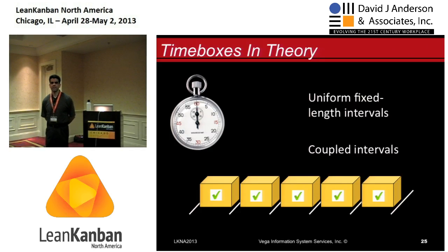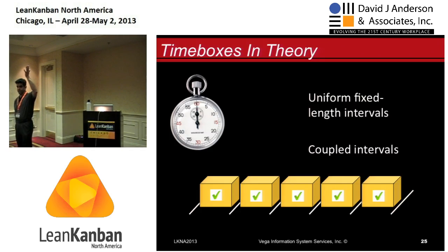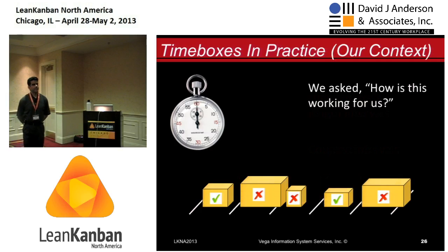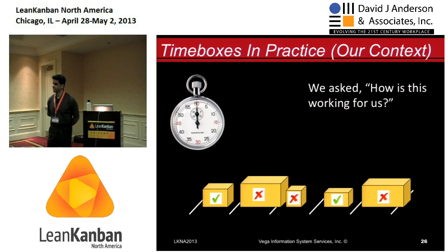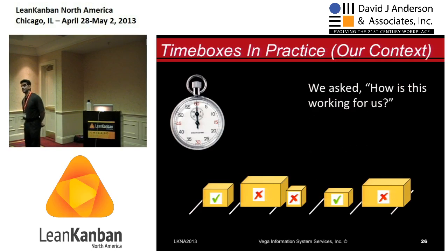And we were also trying to have all of our activities lined up, either at the beginning or end of this fixed time box interval. You guys are all familiar with that, many of you, right? Well, in our context, in practice, as you can see from this bottom line, a lot of the times what we ended up with is situations like this, where we just couldn't get the work nicely partitioned in a good way to fit in that time box interval. And also we had other times when we just came in way under because we were trying to not exceed that interval. And we spent a lot of energy and a lot of time trying to do that.